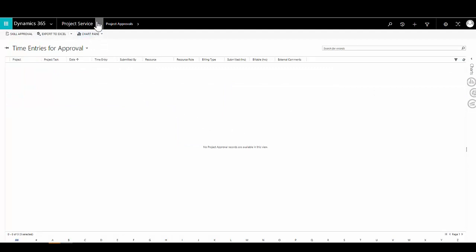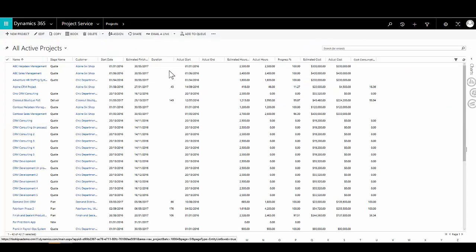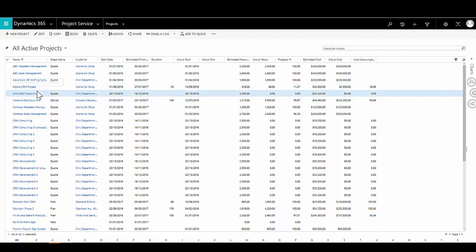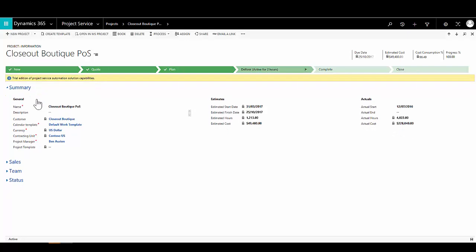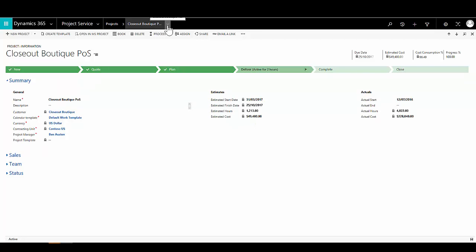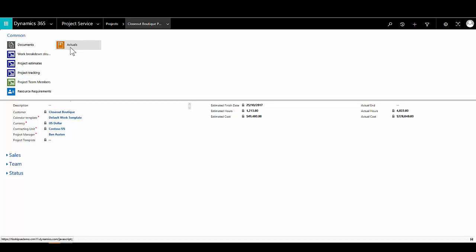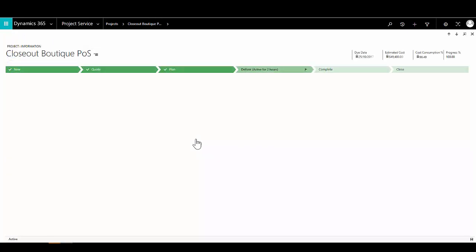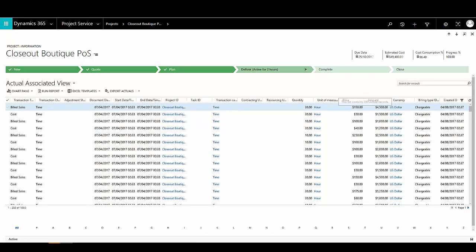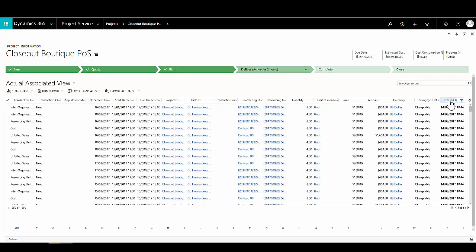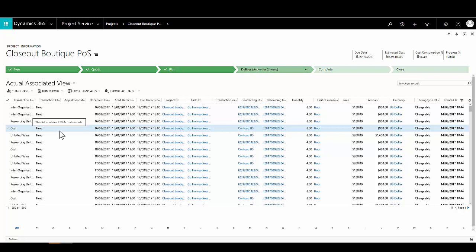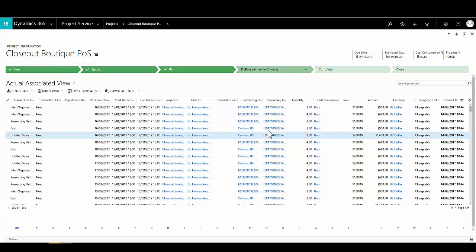Having approved the time entries, I can view for my project all the time that's been submitted alongside any approved expenses, and see the cost incurred in delivering those project activities as well as the revenue generated in charging for them — visible through the actuals view on the project. This information can then be consolidated into invoices to bill the customer, either on a time and materials basis at the end of each week, or based on a predefined payment milestone plan agreed with the customer and captured within the project contract.